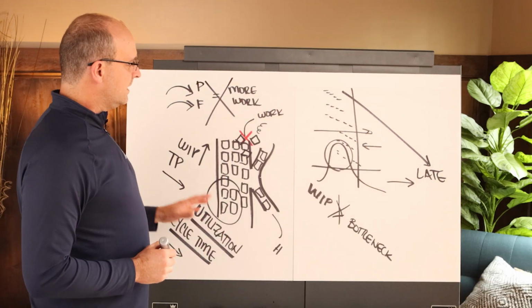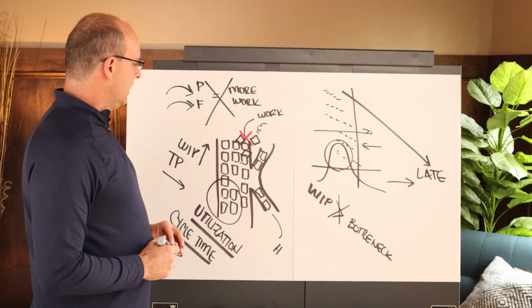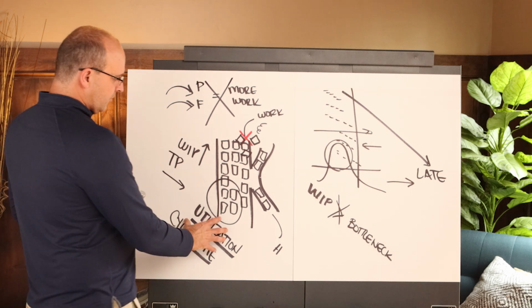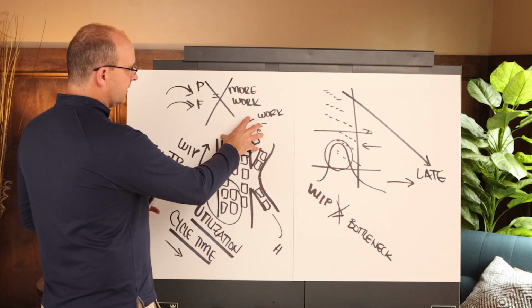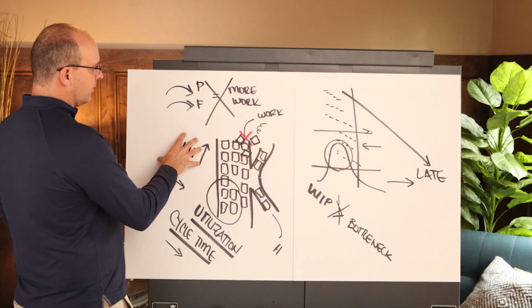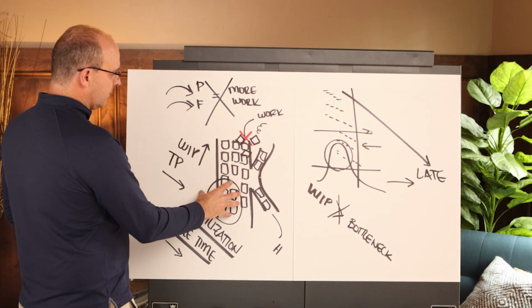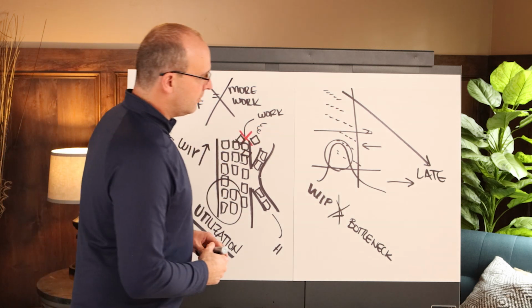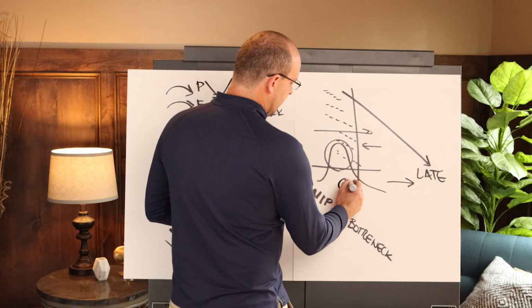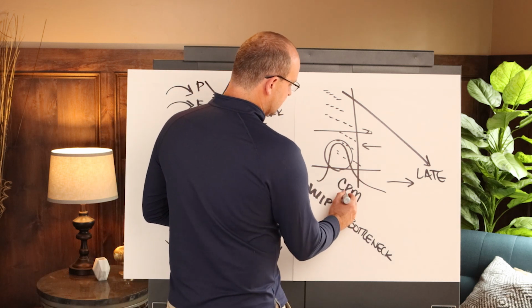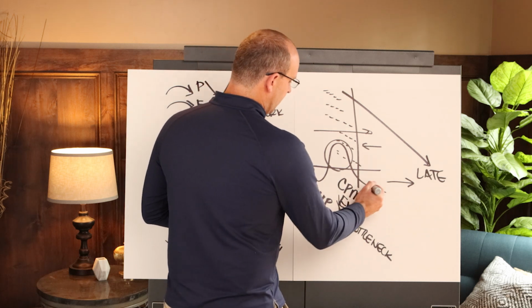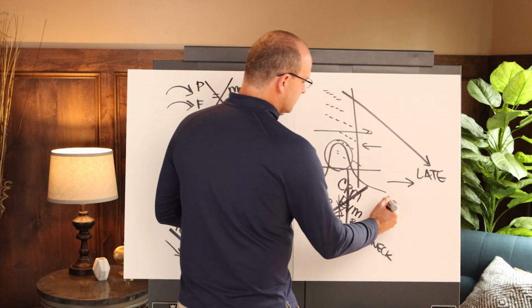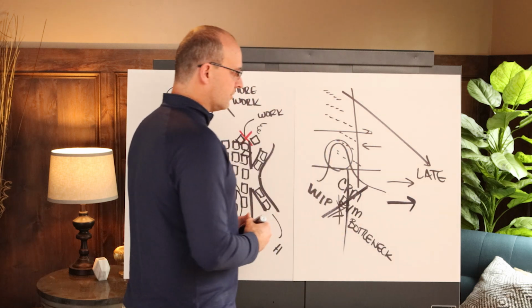So you have to keep these three things in mind. Again, the more your utilization goes above your capacity, the more you push into bottlenecks that aren't removed, and the more work in process that you have, the longer your throughput times are. This shows you that CPM and measurement techniques like EVM, which incentivize you to spend more money faster, are bad because they only extend your overall total project duration.